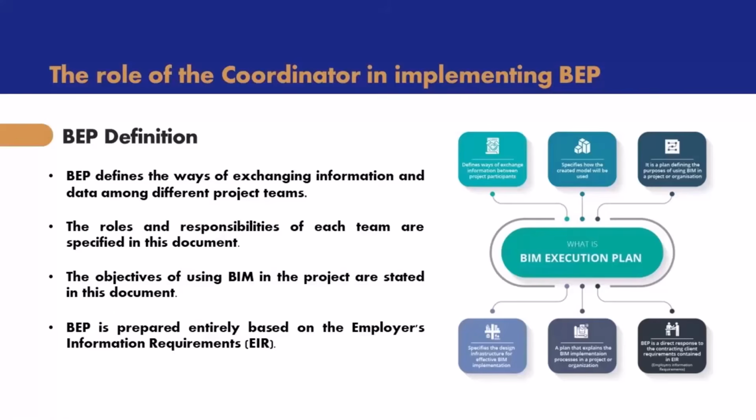Or how do we exchange files and how often we do this? And we have a space to share the files, which is called CDE. Well, an important thing is that we fully specify the roles and responsibilities of everyone and every team in that project. In fact, it includes all the details that we need in the project.